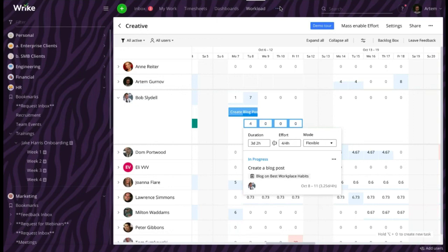So in order to change the report, you can either change its settings or you can interfere with the locations and the items residing there. Because reports always show up-to-date information, if you built a report yesterday based on a folder that contained 10 tasks, and after that you opened that folder and deleted 5 tasks, then your report would no longer show 10 tasks, it would show 5. So I hope this answers your question, Andy.